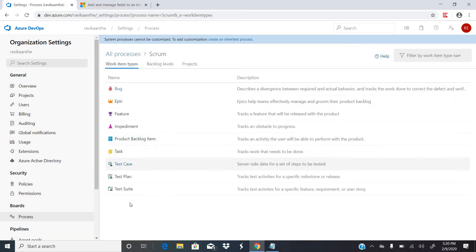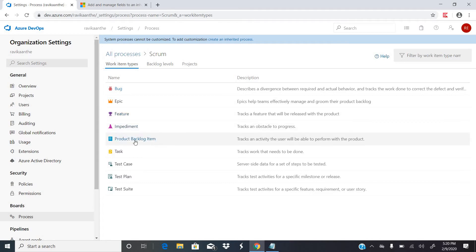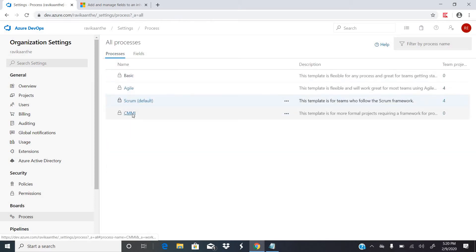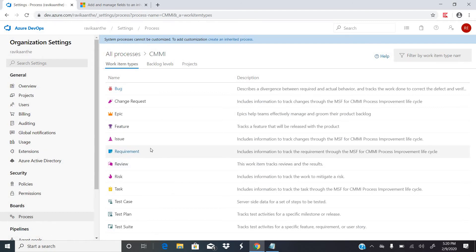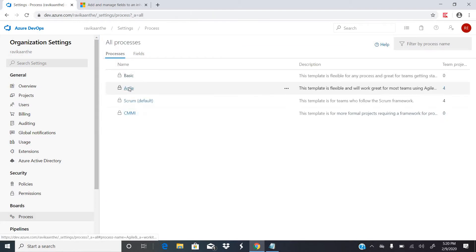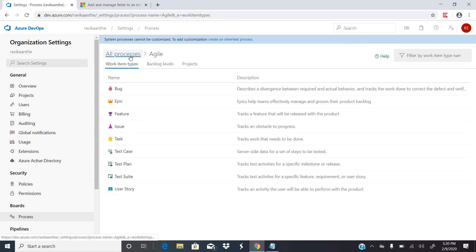Under Scrum, the work item types are: Bug, Epic, Feature, Impediment, Product Backlog Item, Task, Test Case, Test Plan, and Test. If you go to the CMMI process, you will not find Product Backlog Item — instead you will have Requirement and also Change Request. For Agile, these are all the work item types defined in Azure DevOps.